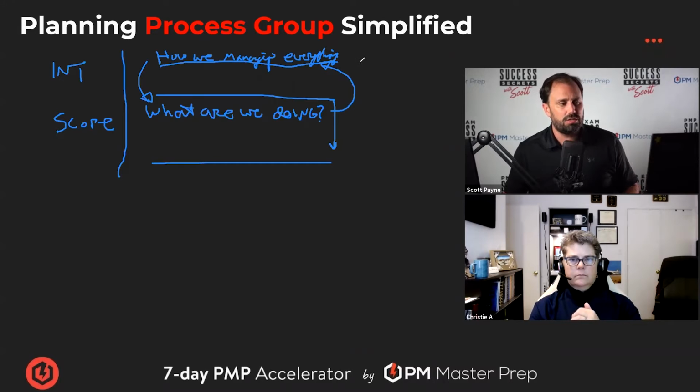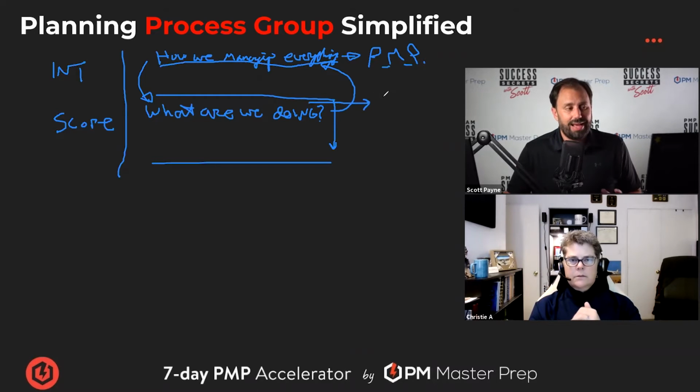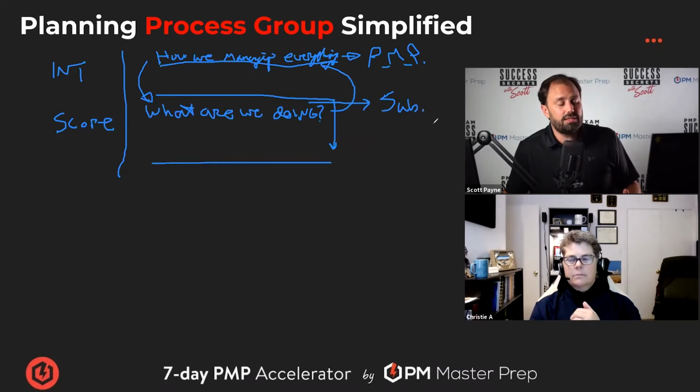What's the plan that brings all the plans together called? The project management plan. Yeah, that's the big one. PMP, yes. And every one of these little areas, scope, schedule, cost, whatever, has a micro plan, right? Correct. And that's called what? The subsidiary scope management plan. Yeah, you got it. The scope management plan. It's basically the knowledge area name plus management plan.